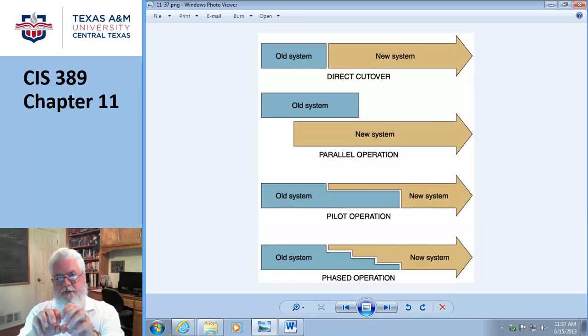Then the next 2 weeks on the calendar, they go to the next organization and switch them over. So this is least expensive from a training perspective, and a roving team of 5 or 6 people can just run across the nation, slowly converting you over. So this is probably one of the best. It is rather expensive, but it does provide an opportunity for lessons learned.